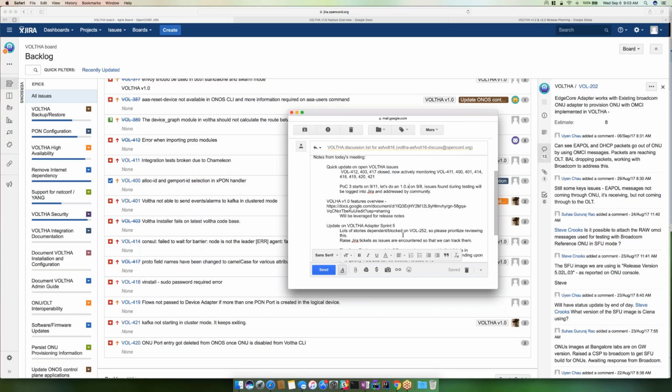But the gotcha would be, if the adapter is going to be pushed out a bit, you're going to need the 1.0.x fixes in order to continue with the testing that starts on 9/11, because that probably needs to be alive for 2 weeks, pending the adapter being done.